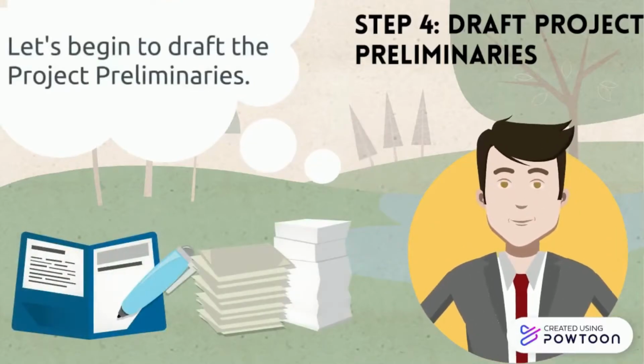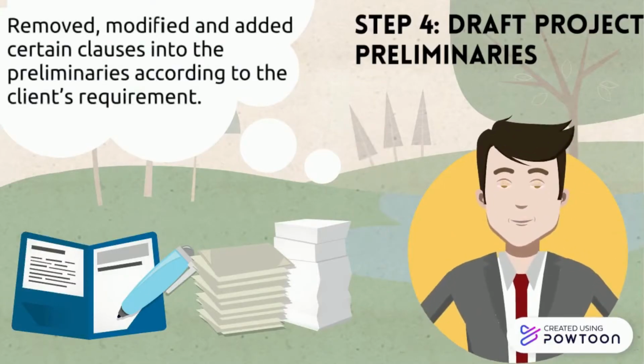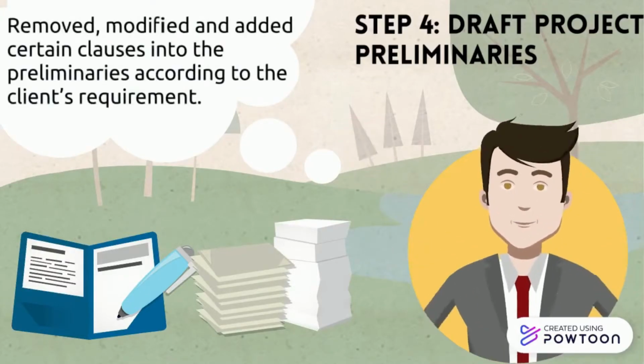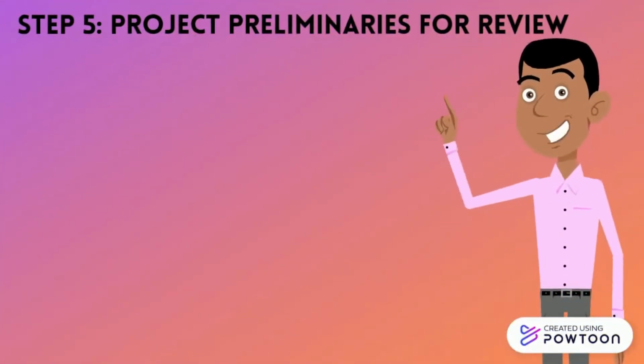Within 1 week upon receipt of questionnaire or confirmation letter, QS shall begin to draft the project preliminaries. To produce a project preliminaries that fit to the private mixed commercial project, certain clauses in the standard preliminaries may be removed, modified and added into the preliminaries according to client's theme. Step 5. Project preliminaries for review.